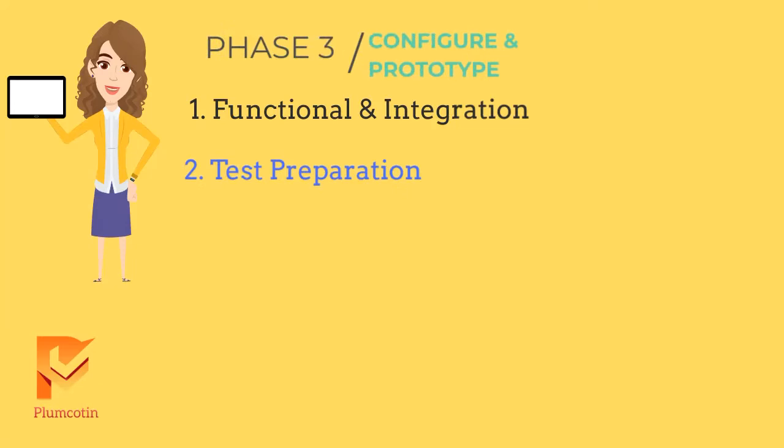Test preparation. A series of documents that describe testing methods. What components of the Workday service will be tested. How they will be tested. The processes and procedures of how elements of the system will be tested and issues resolved are documented. Each report identified as part of the project scope will be created and unit tested.